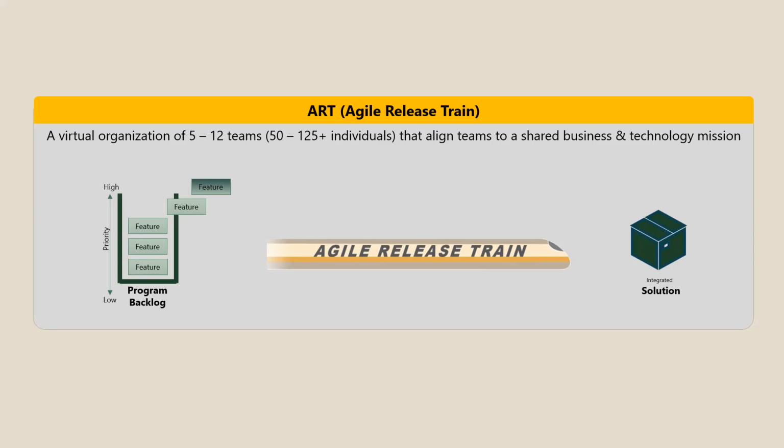The reason why we are capping at 125 is that it's based on a number called the Dunbar number. You can Google it, D-U-N-B-A-R, Dunbar number, in which it is said that the number of people with whom you can effectively communicate and have social relationships is 125. So if you're able to effectively communicate and socially have good relations with 125 people, the cap is placed at 125. That is what is called the Dunbar number.